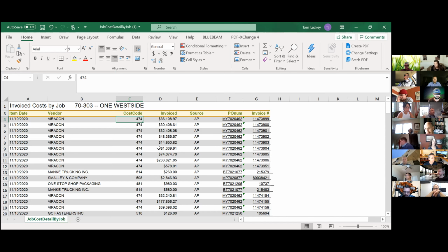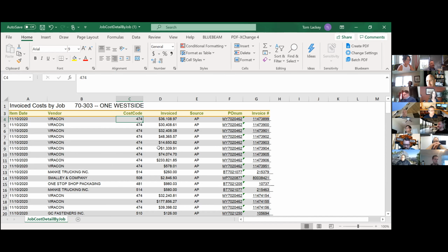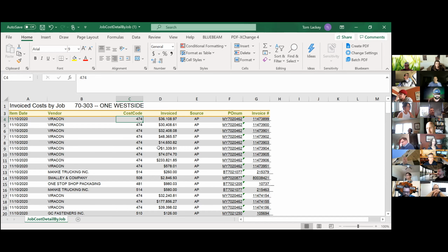And again, this is just for stored materials. And Lisa, you brought up embeds or something like that. If you have a Nanodore shipping direct to the job site, it's going to be shipped towards the end of November. You can bill it on here 100%, the material portion of it, because it's not a stored material.